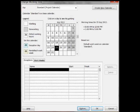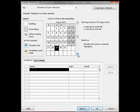You can also click on options and modify the working day information there. When you look at the calendar, you will notice that working days are in white and non-working days are in grey. If there are any public holidays or normal holidays, they should be recorded in the calendar.